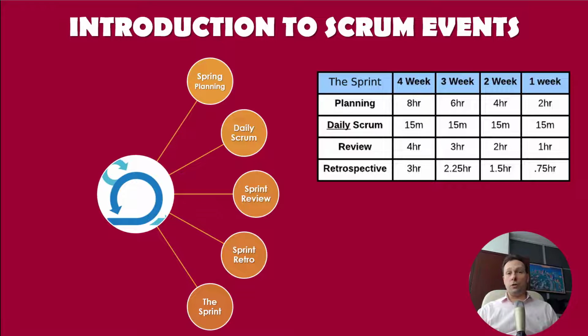Suggestions that will change the sprint goal will go in the product backlog and can be implemented in the next sprint if that's what the product owner decides. Now let me give you one example from my work. We were developing a mobile app that allows users to search for food and drink specials at local restaurants. So the sprint goal for this sprint is to set up the user interface. So this is everything that the end user will see and interact with.